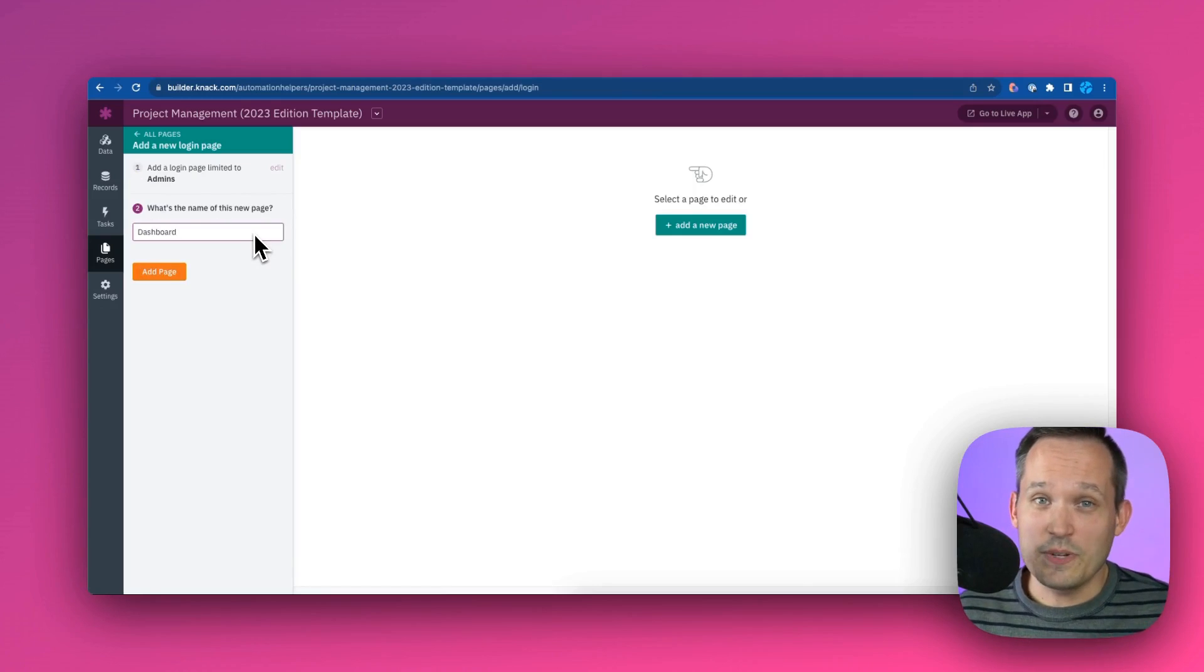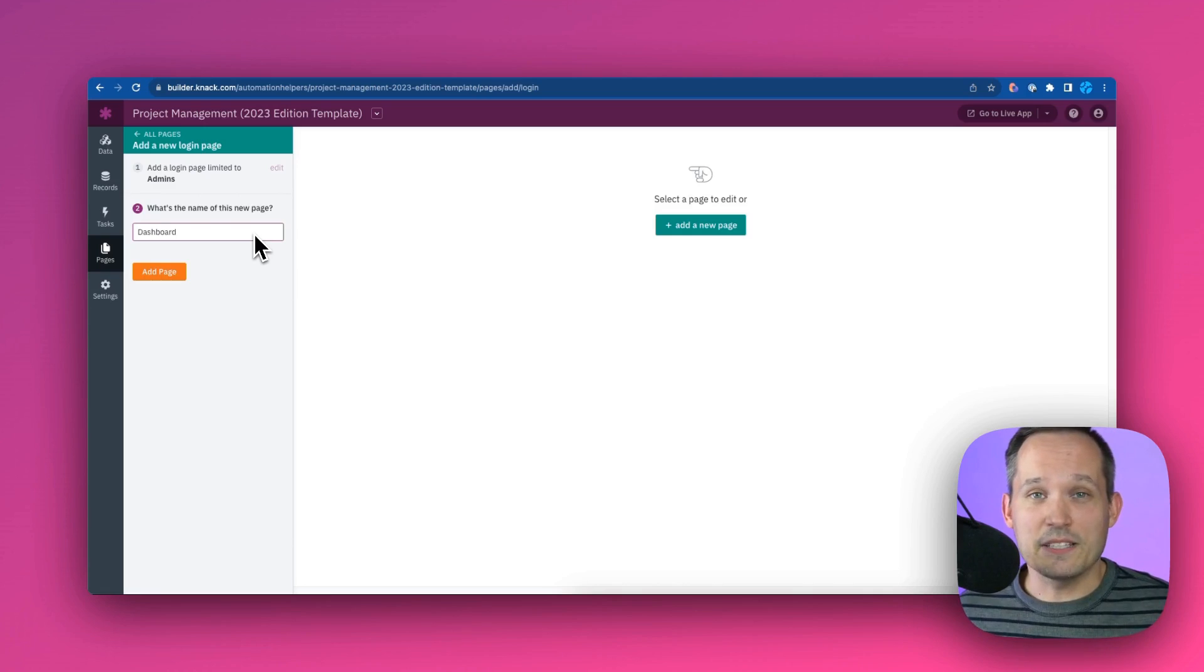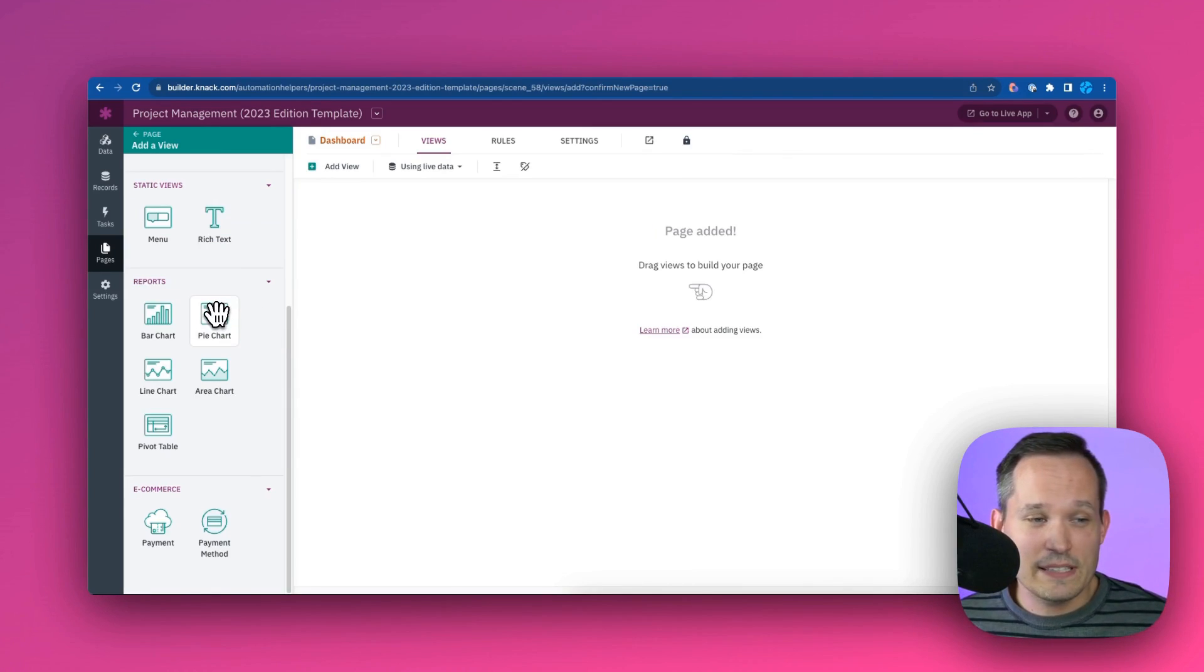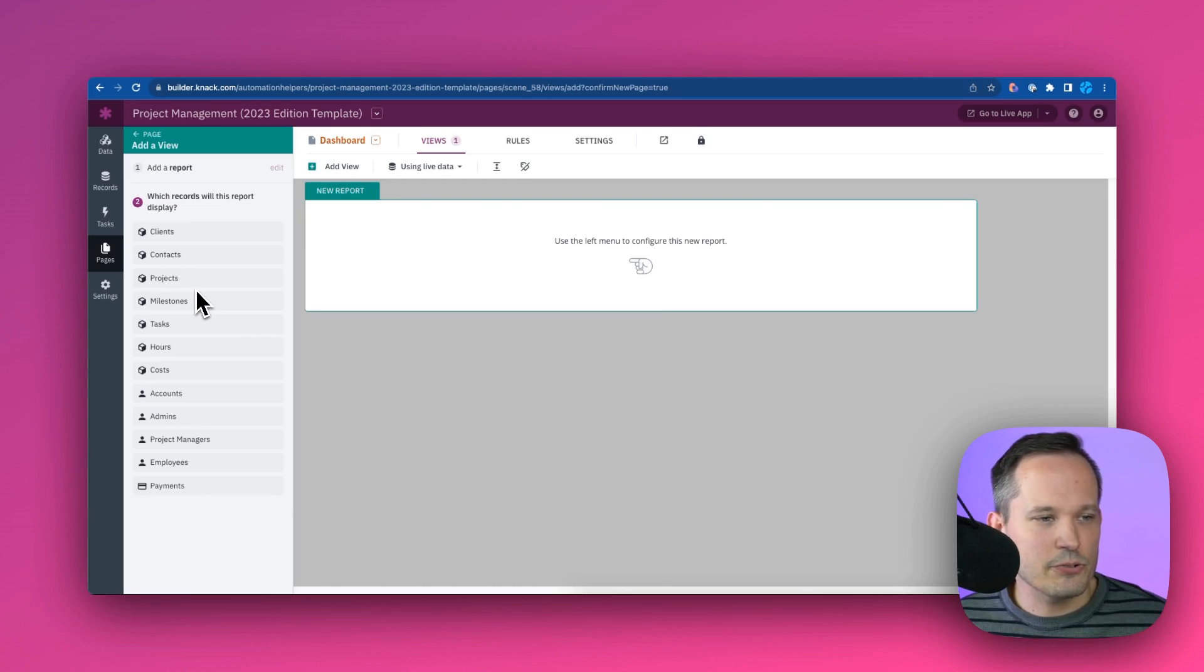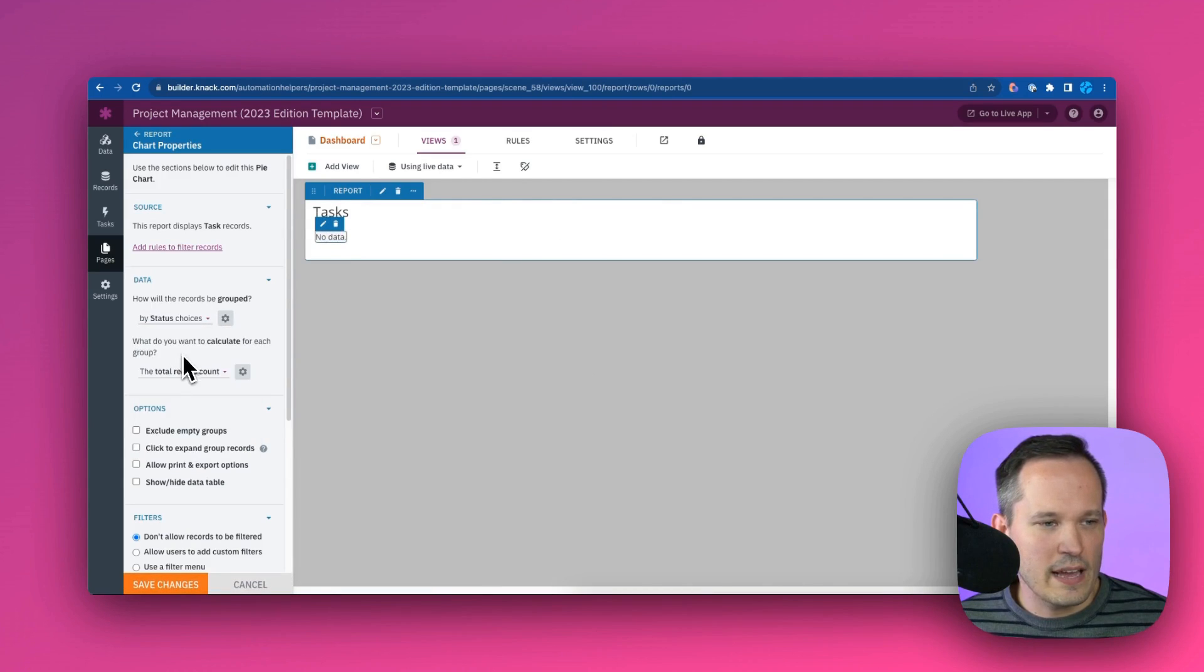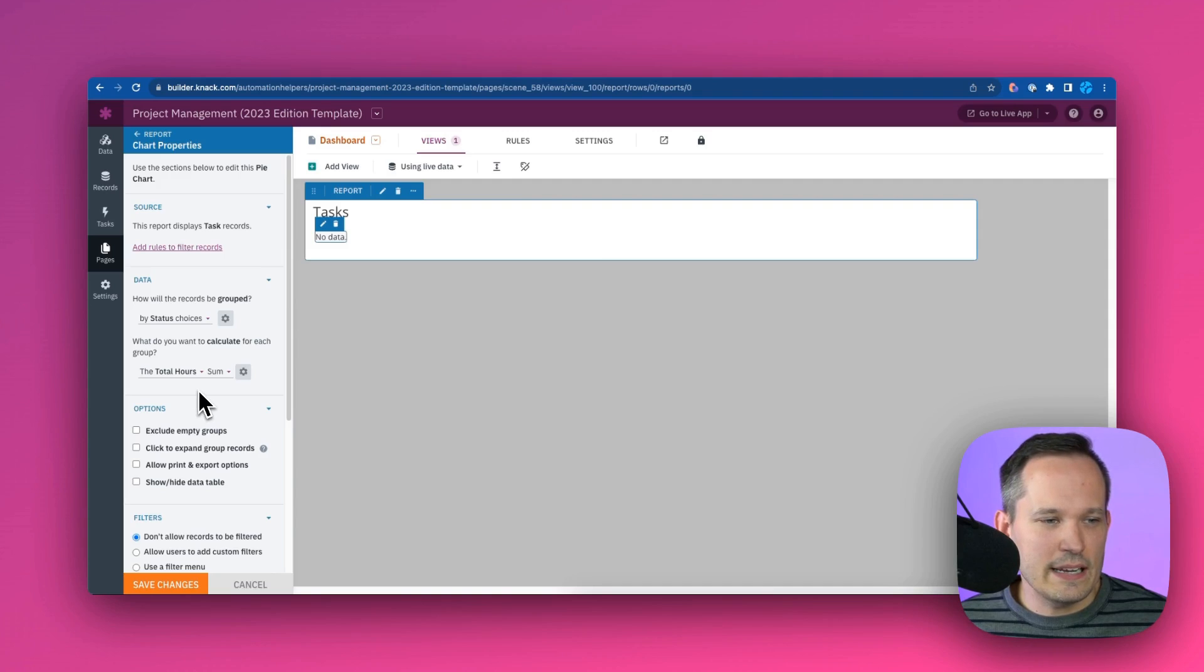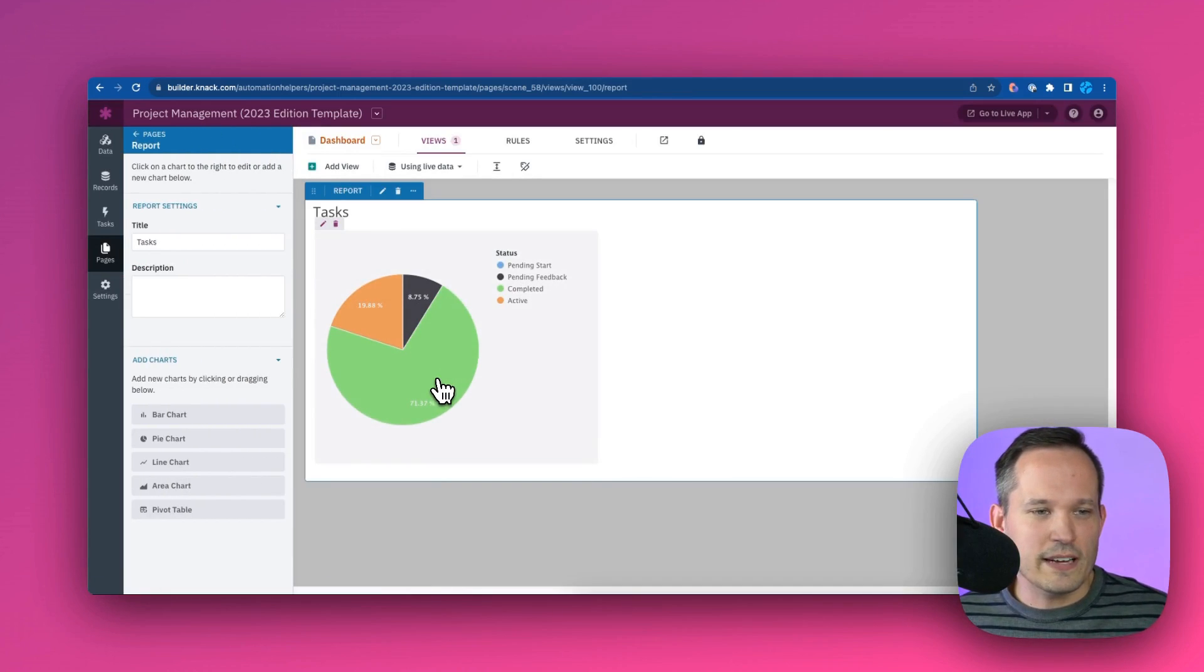So I'm going to do this - we don't actually have a dashboard that can show a report for our admins. Presumably, we'd want to see some kind of reporting data on our current tasks that we have. So I limited this to only admins. And I'm going to keep it really simple. But I'll add a pie chart here. So I'll click on this. And then I can configure this report on the left-hand side of the screen. I'm going to do this based on tasks. And then I want to group these tasks instead of by the tasks name, I want to do this by the status choices for that. And then instead of total record count, we're going to go by the total hours. So we can see roughly how many hours we need in each of those areas. I can save my changes. And now I have my nice pie chart that's reflected with my data here.